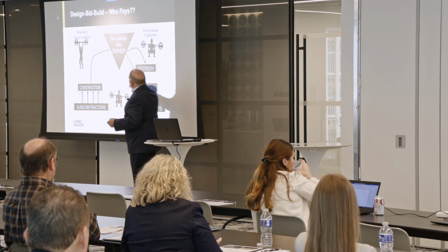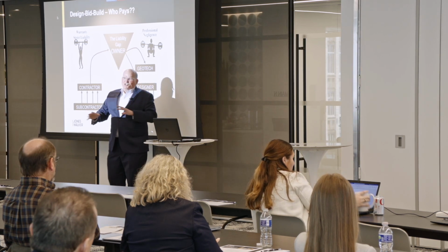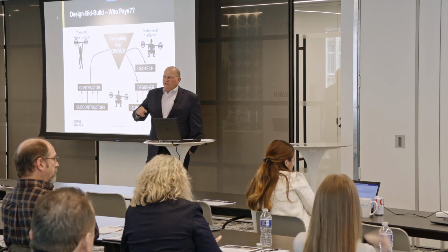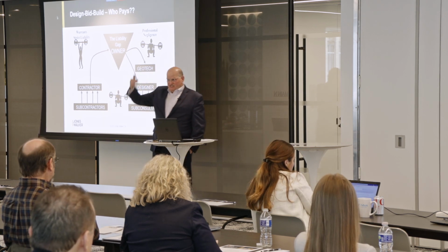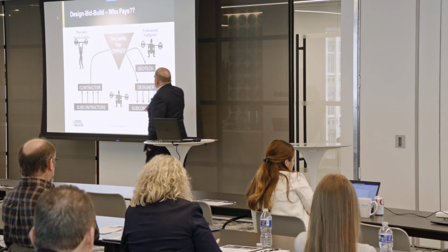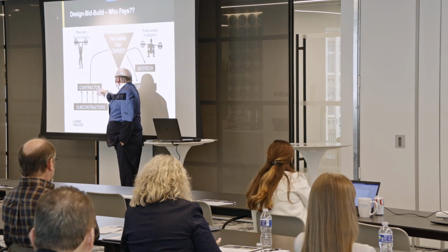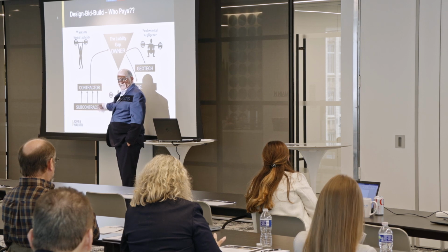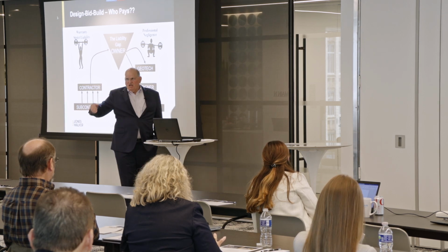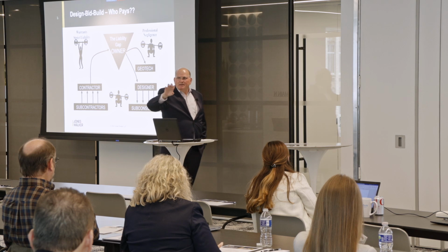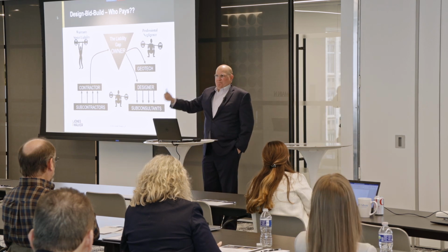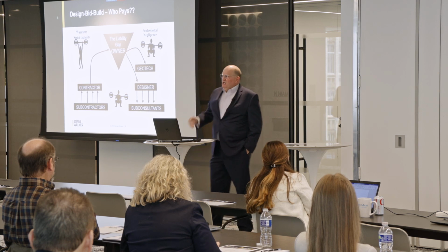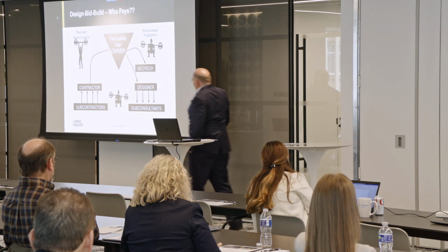Other thing I'd point out, generally speaking, there's some cases on this specifically. I haven't looked at it lately, but it's consistent with flow-down obligations. Typically, the contractor is going to owe the same implied warranty of plans and specifications to the subcontractors. Now again, there may be some funky circumstances that muddle that pass-up liability, and that's kind of some of the stuff we're talking about.